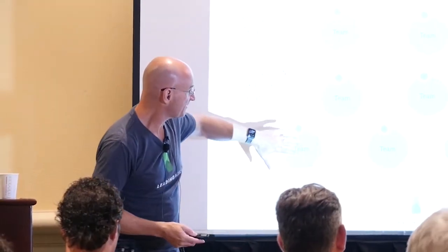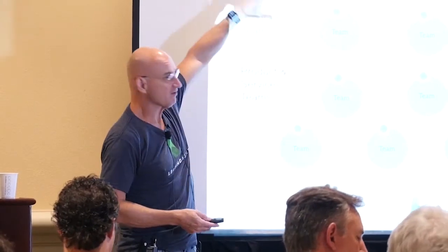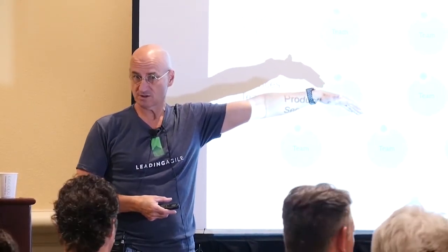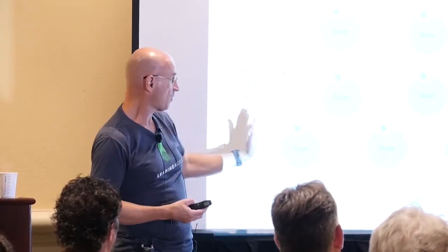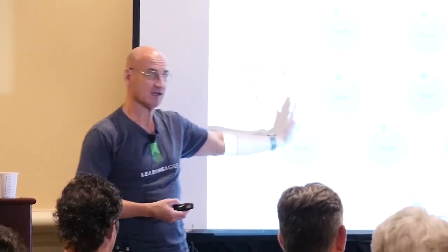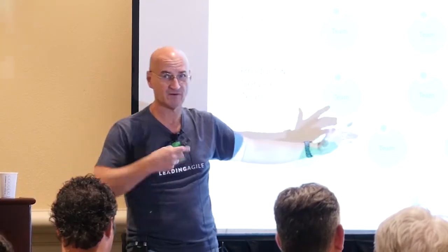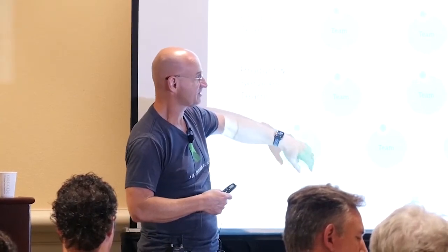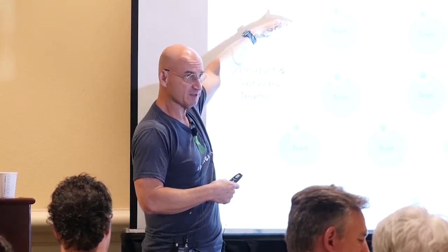So when we set up these structures, then we're going to create a governance model that allows us to understand how work flows across that structure. And traditionally, for most delivery teams, we're talking about Scrum. Delivering very frequently, probably every 2 weeks, backlog, working test of software, pretty simple process there. And typically at the program tier and at the portfolio tier, we're thinking more of a Kanban. It's more flow-based. We're thinking about the flow of value through the system.